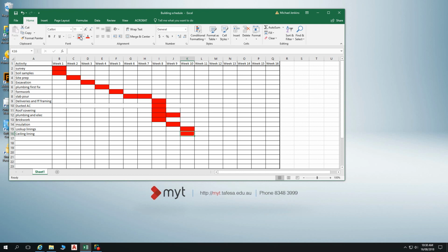Okay. What's happening after that? Tiling. And you're going to have wet area waterproofing. You're going to have to tile, so you're going to have that done first, because that takes a few days to dry. Wet area waterproofing, when's that going to be happening?